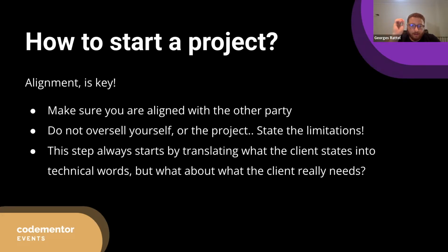And the reason I'm emphasizing that point is that you cannot figure out what the client really needs by just asking them what they need. You cannot figure this out in one session or even two. This is a long process that needs to have its own timeline and its own milestones and its own investment even from both sides, because it will literally define how everything will continue from there on.